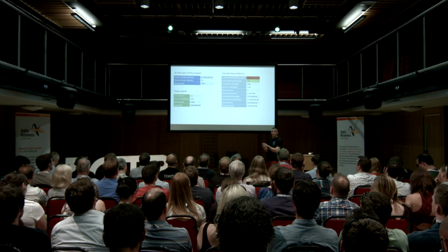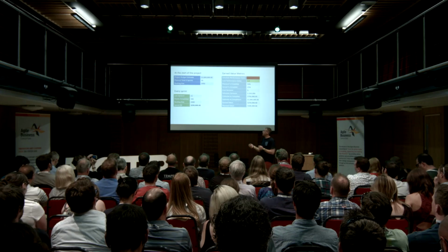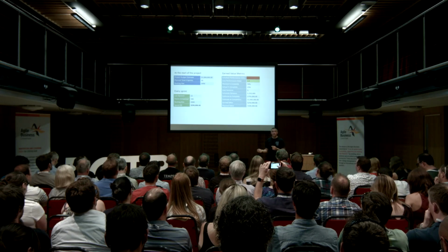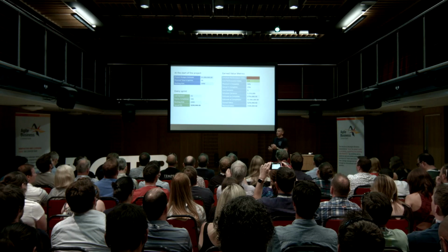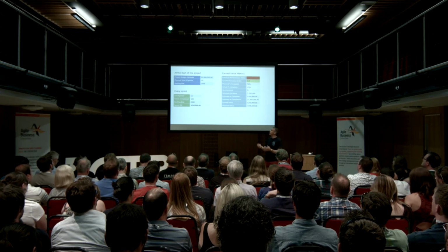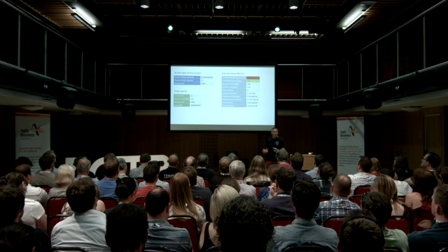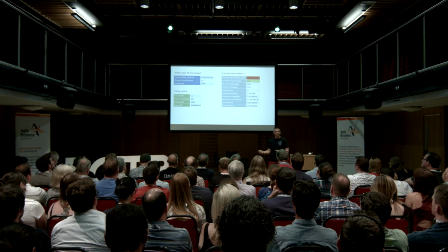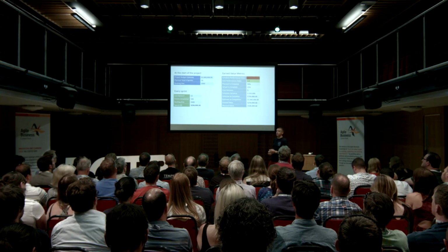Just an example to show you kind of the other way around. If you had completed 500 points, but you'd only spent $250,000, then the numbers would switch a bit. So we're still pretty far behind schedule-wise, but we've only spent a quarter of the money. So actually we spent the right amount of budget for the amount of work we've delivered. So budget-wise, we're on track. So we got a 1 for our CPI.